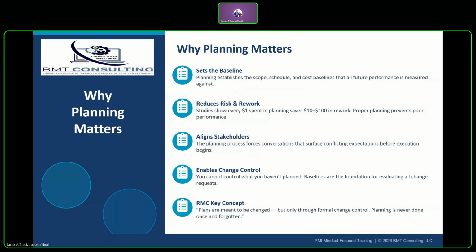So what you do is rolling wave planning, which means you plan that first phase or the first milestone in detail, everything that's going to happen up to that first milestone. The rest of the milestones in your overall plan are going to be planned from a very high level. Just, hey, these are the major dates, these are the major things that we're going to do. And then as you learn while you're doing that first milestone, you're progressively elaborating on what you've already learned, and then you're going to apply that knowledge to the next phase in your planning process when you start to plan that next phase.